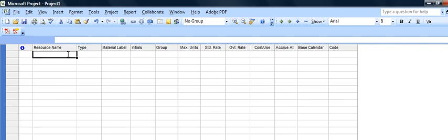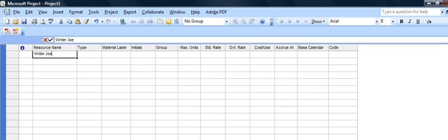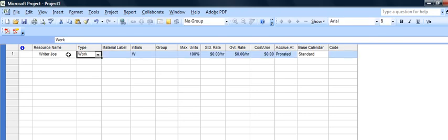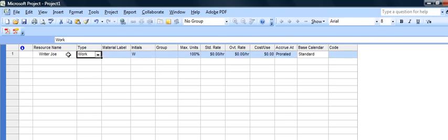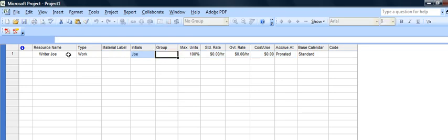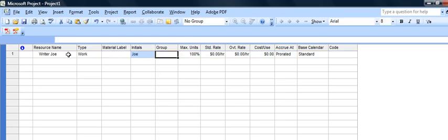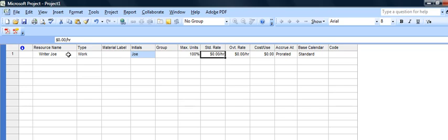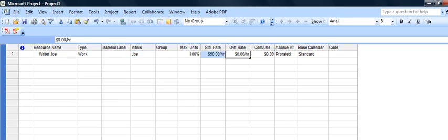So let's say our writer, Writer Joe, is one of our resources. He's going to do regular work, let's give him initials Joe and maximum units is 100, that means the most he'll work is his 40 hours. Let's say we'll pay him $50 per hour and now let's not give him any overtime.